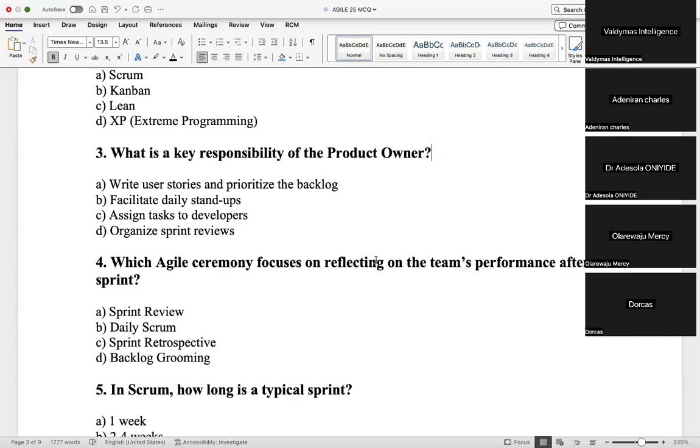That is why one of the meetings we always have in the early phase of every project is what we call a BRD meeting. BRD meeting is where we write the business requirement document. We want to gather everything the business wants. Once we have that BRD approved, a BA and a PO will now work together to ensure that that BRD is converted to technical requirements. When we have gathered all the technical requirements, it helps us to break them down into user stories. It is at the user story level that the development team is able to use it for development.